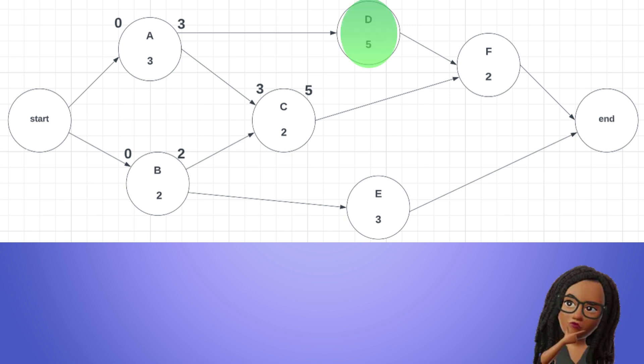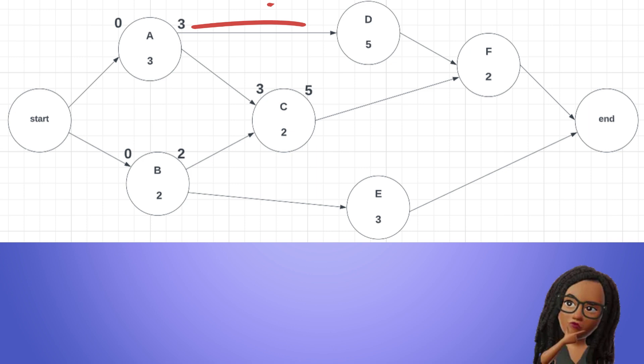D has only one predecessor which is A, so it can start as soon as A is finished at time period 3. Therefore, the early start for D is 3. The early finish for D is 3 plus 5 equals 8.